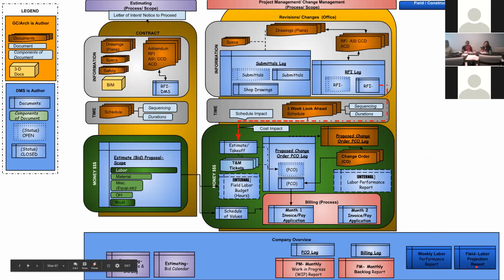And there's a predicting tool called the labor projection report, where we're forecasting how many guys we're going to have and where they're going to be. So it allows us to ramp up. If we have the Kern project, which is a $6 million project, we're going to be doing exterior framing, and the value of that is about $2 million. It allows Dave Legier to say, okay, I need to start hiring or buying equipment before we get to that place, and allows us to plan for the year.